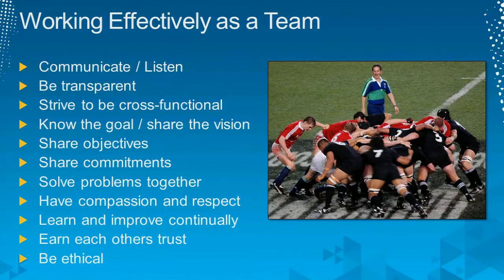I've already mentioned sharing the goals, the vision, the objectives. Share the commitments. One thing we talk about in Scrum is you commit to delivering a certain piece of functionality in that sprint, and then the team brainstorms to break it down into tasks. So if we're going to take a user story, which is we would like a Twitter feed to sit on our homepage so that people that visit our homepage can see recent tweets about our product or our company.